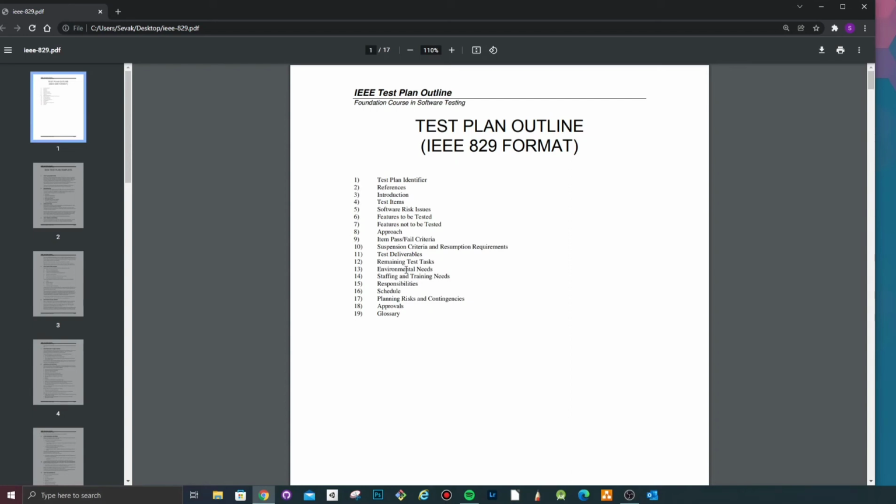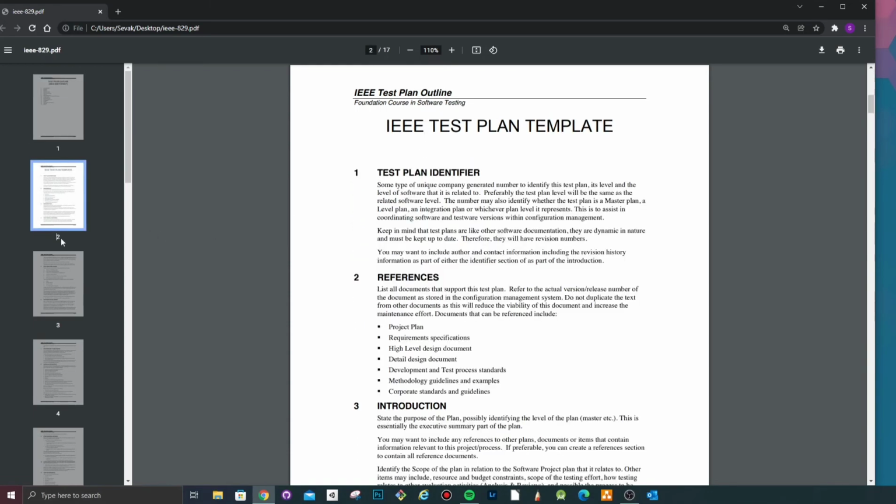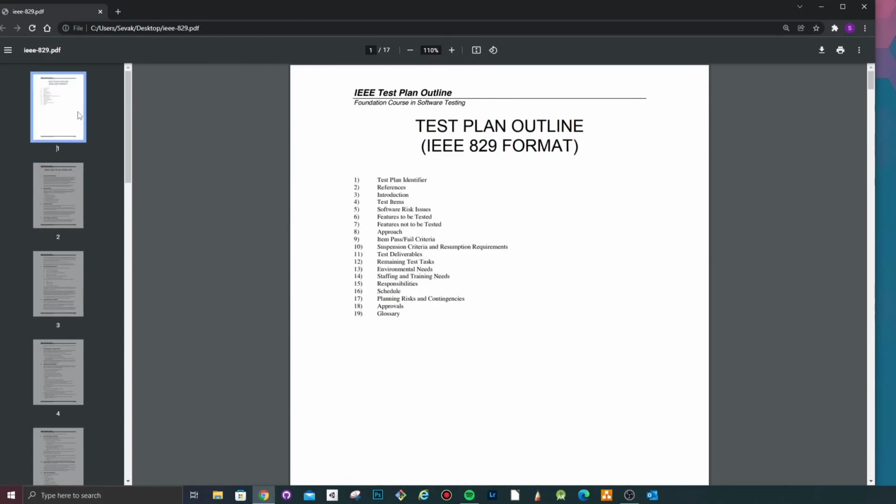But from my experience, I have seen in many cases projects not having this, and the reason why they skip it is because, over the evolution of the processes, specifically around Agile and Scrum, a bunch of these things change very frequently. You might plan something in the beginning and it will change, because Agile processes expect the requirements to change as you're building something, and as requirements change, the testing needs might change as well.